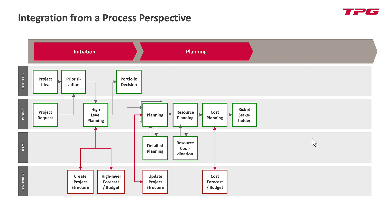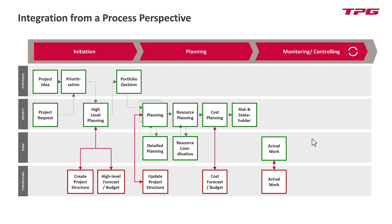The project executes, going into artifacts like risks, issues, and stakeholder management. Finally, we start the project, which means we will have actual values — actual hours tracked by team members. This can happen on the PPM side, which is most common in our customer environments. But a number of customers also track actuals on the ERP side in SAP CATS, the cross-application timesheet, which allows team members to track actual costs for projects but also for cost centers. Project actual costs need to be synchronized into the project schedules to update the project and give project managers insight on where they are.